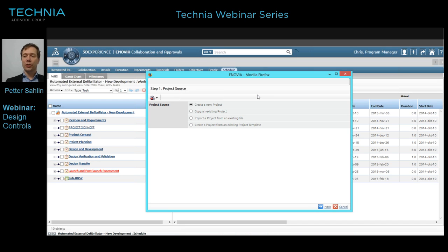For example, if it's a supplier which is providing a component on my critical component list, I typically want to have some predefined tasks for notifications sent to my notified body. And if that's the case, I will want to have those tasks predefined. So that's typically the kind of categories of projects I want to run with. One thing is the definition or size of a project.